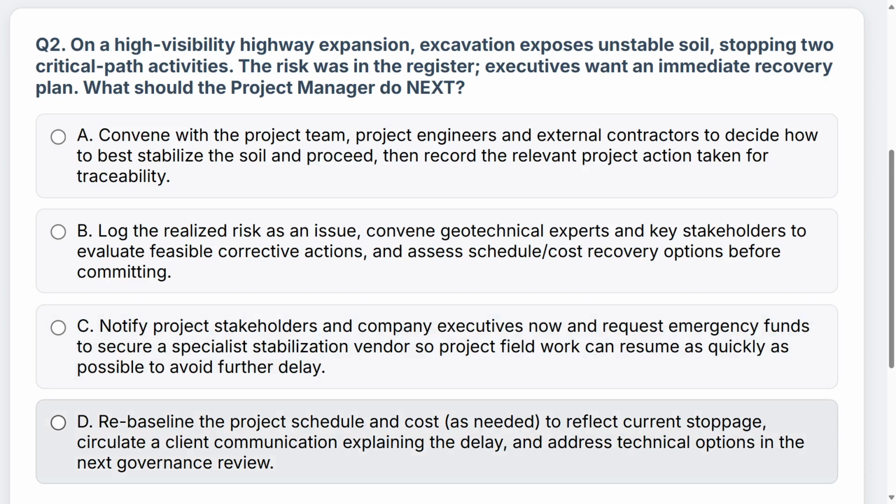Let's start from the bottom up this time. It's a good practice sometimes for those who are hasty to get through A to D to start from D and go up. So, D, rebaseline the project schedule and cost as needed. Now, while this is not a bad thing to do, it's not your first go to because you need to understand what exactly you are rebaselining. You may or may not need to rebaseline schedule and cost to a certain degree. You need to understand if at all you need to rebaseline anything and the degree to which you do.